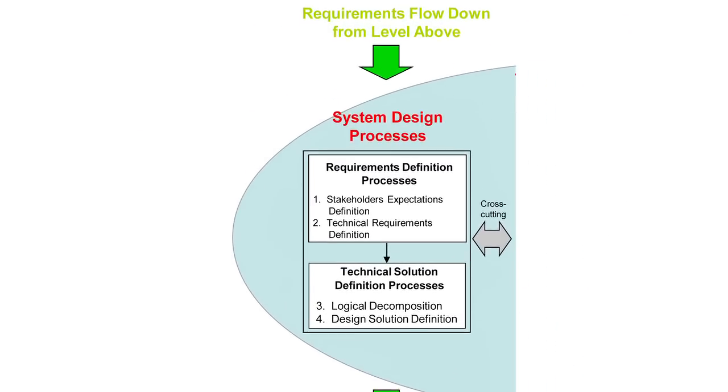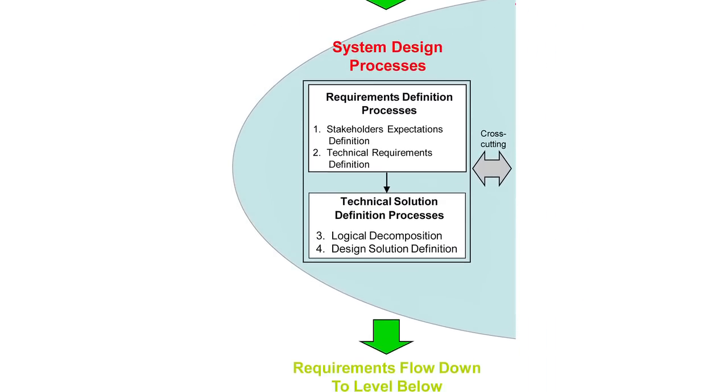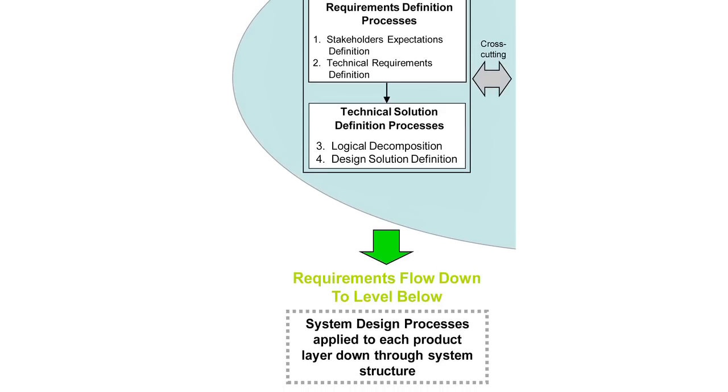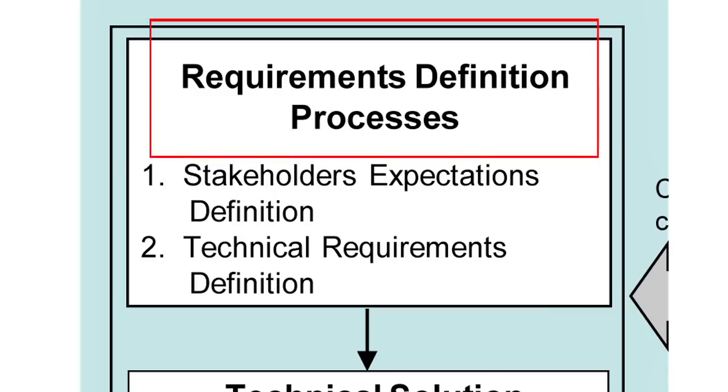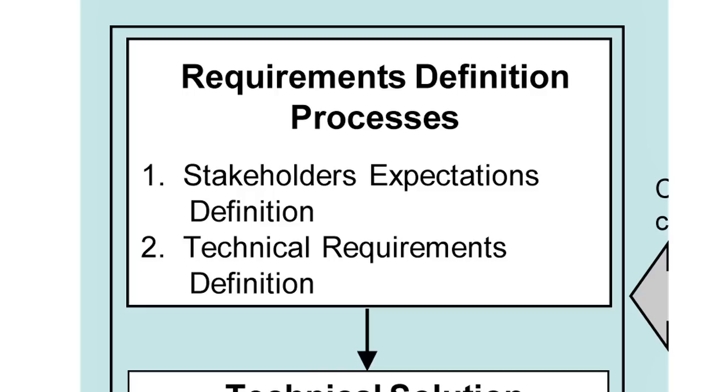The system design process on the left-hand side of this engine describes how we take that high-level goal and break it down into lower and lower-level requirements, to make sure you really understand how each small piece of the satellite has to operate, what it needs to do, and how it needs to perform.